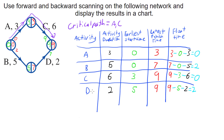Note that this doesn't mean I can delay both B and D by two minutes each — if I delayed both, I'd run late. That two minutes is shared across that path. To summarize: forward scanning gives you the earliest start times; backward scanning gives you the latest finish times; from those you calculate the float times. The path with no float is your critical path, which in this case runs through A and C.